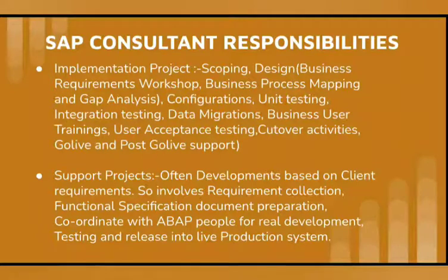If a company needs to migrate from SAP ECC to S4HANA, we need to download all the data from SAP ECC and load it into S4HANA. Or if it is a completely new S4HANA implementation, that is a greenfield implementation, then all the manual, paper-based data is to be filled in the templates by the business users, and this will be loaded into the S4HANA system. So how can the users fill the templates?